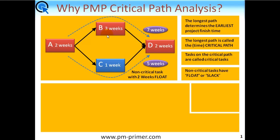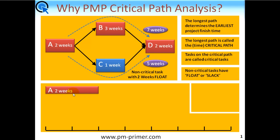The way in which this network is drawn is called a network diagram, for obvious reasons. But there's another way of showing tasks, and that's by the Gantt chart. This is shown by illustrating each task along a time frame — here I've calibrated this in weeks. If we now looked at that example as a Gantt chart, here's the first task, Task A — a bar whose length is two weeks in duration. Task B, which happens after it, is three weeks.